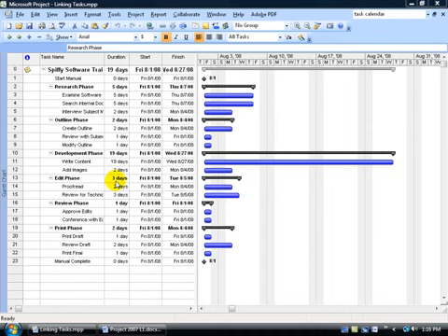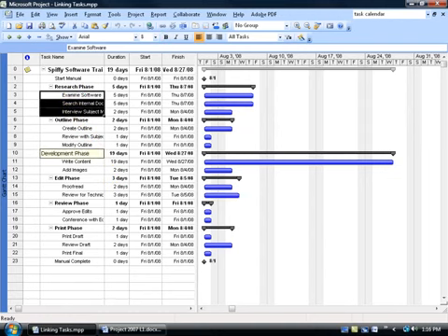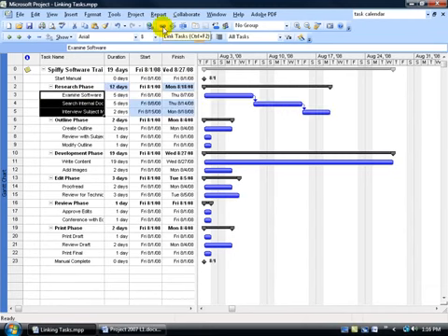But right now, let's just go ahead and link up our tasks. To do that, it's really easy. All you have to do is go ahead and select all your subtasks. For example, clicking and dragging down below, and select my 3 subtasks. I want to link those 3 together. I'm not going to link my summary task. By default, when I link the subtask, the summary task will follow suit. So to keep it simple, select these 3 subtasks that I want to link, come up here on the standard toolbar and click on the Link Task button, or hit F2 on the keyboard.